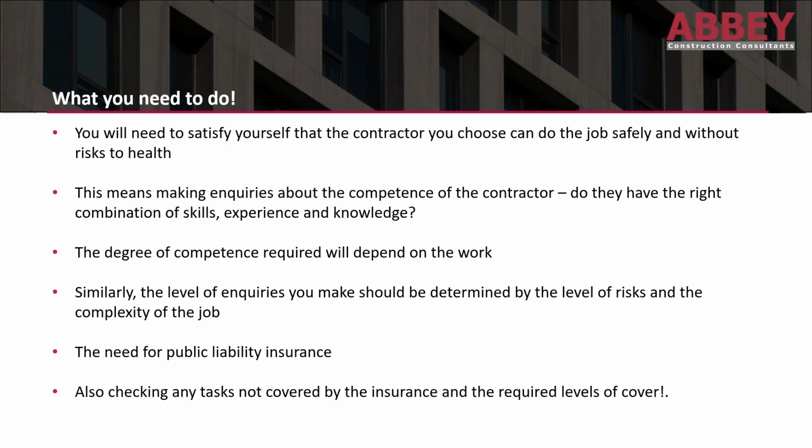So you need to make sure the person or the contractor organisation you're bringing on board has got that public liability insurance for the right amount that your organisation requires. Also check any tasks that are not covered by the insurance and the required levels of cover.